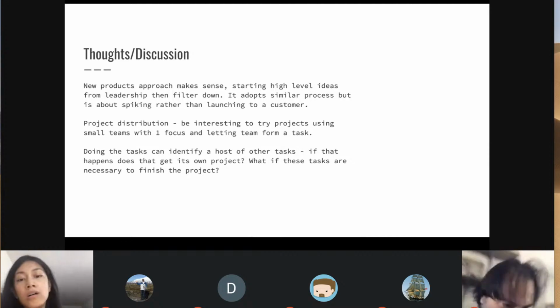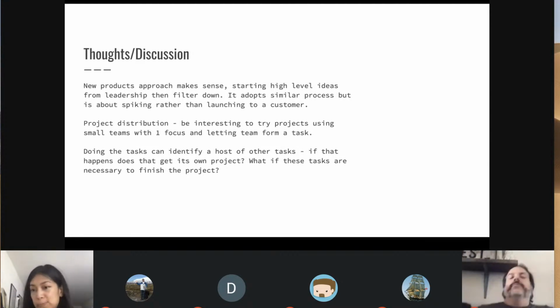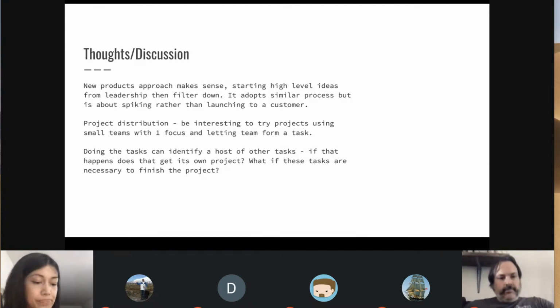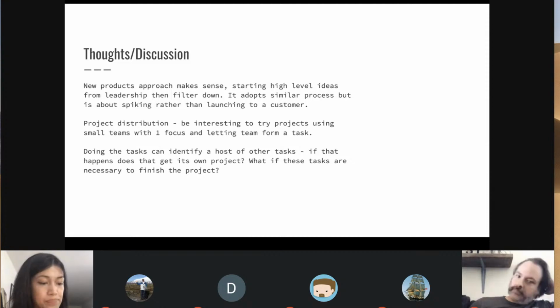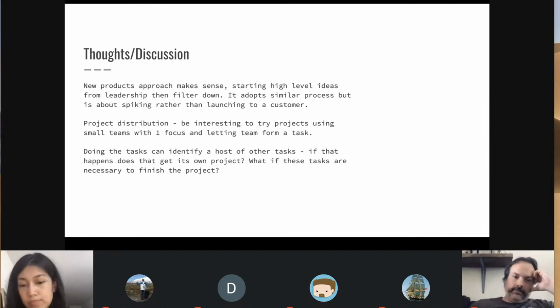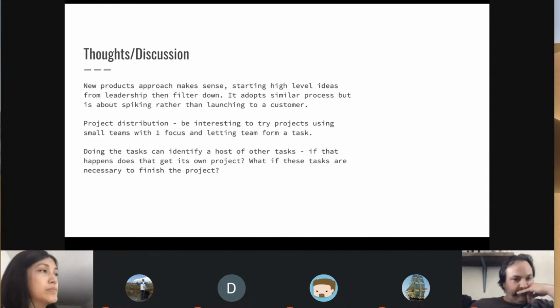And what does that mean? That means at the end of the cycle, either we decide, oh, we really need this enough. We have enough appetite to want it. We better put another cycle for these other things. Or maybe they decide, oh, this project is not worth the appetite because we only thought it would be one cycle, but these new things are going to make it a 2 or 3 cycle.